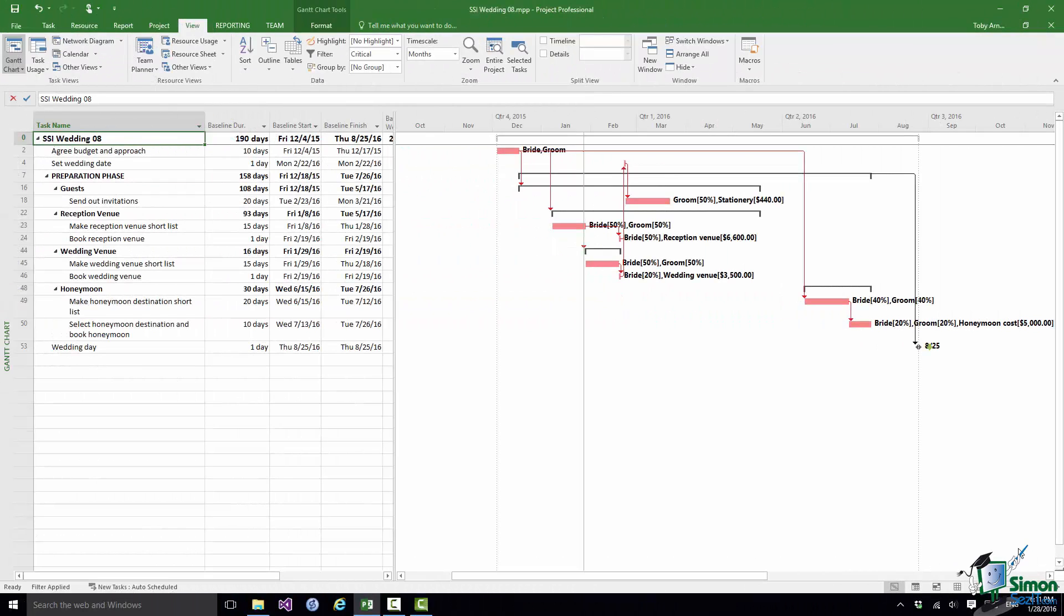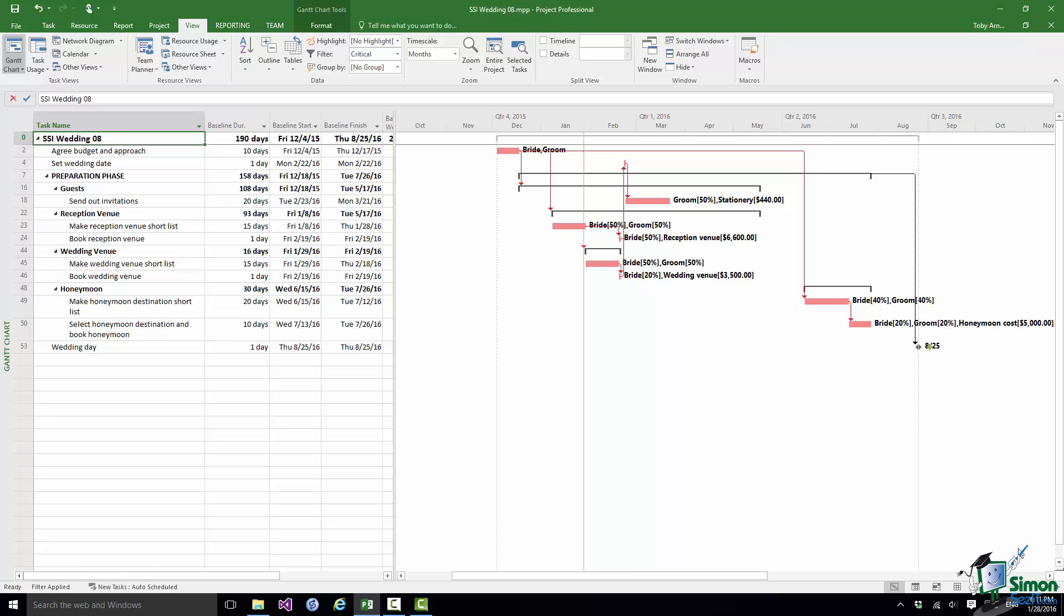Now it's quite often the case when you look at the critical path on a project that it is a continuous critical path. What I mean by that is that for every day of the project from the very beginning to the very end there is at least one critical task happening. In this particular project that is not the case. There are I think three significant gaps. Sometimes gaps are completely explicable, they're there for a good reason, no problem with them at all. Sometimes they can indicate that maybe there's a problem with the way that you have your project set up. Let's just take a quick look at a couple of the gaps here.